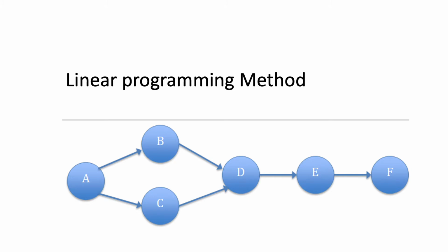For example, if the activity doesn't lie in the critical path of the project, then you might not want to consider crashing the activity, right? So the critical path of the project is the sequence of activities that you need to perform from start to end, considering that you can perform other activities, which can be another sequence of activities, in parallel, for example. You can find a video on my channel about fast tracking and crashing for more details.